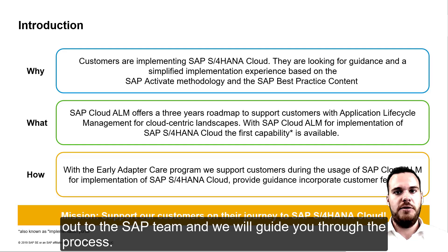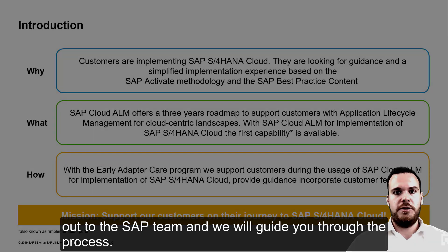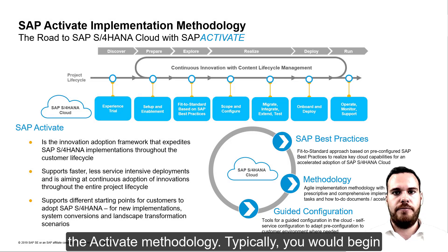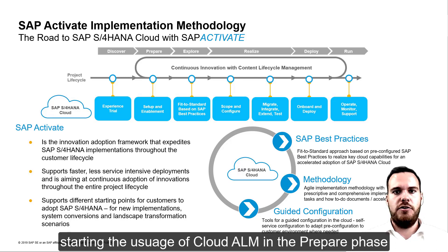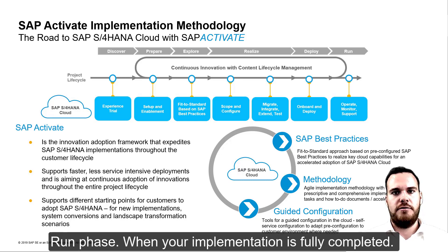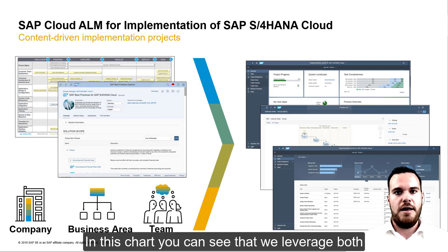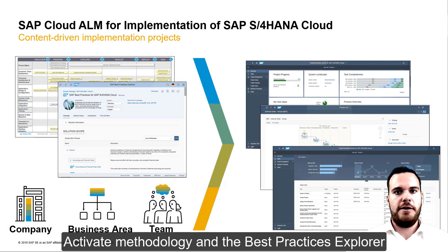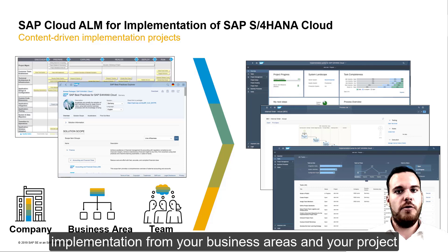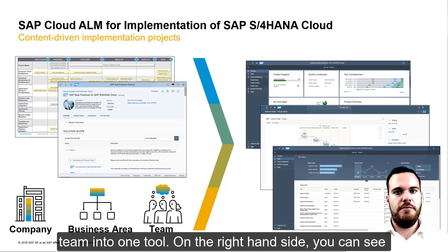Just reach out to the SAP team and we will guide you through the process. You may also remember this slide where I showed you the Activate methodology. Typically, you would begin using Cloud ALM in the Prepare phase, and it helps guide you smoothly from start to the Run phase when your implementation is fully completed. In this chart, you can see that it leverages both the Activate methodology and Best Practice Explorer to map the demand of your company from your business areas and your project team into one tool.